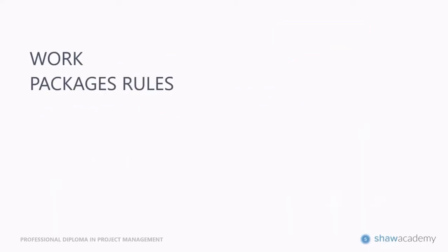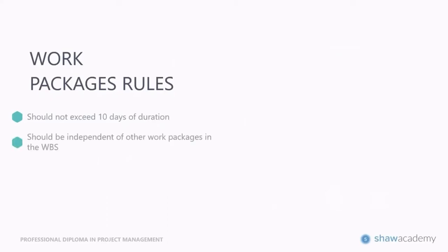Now, like everything in life, work packages have rules, and the first is that you should never exceed a 10-day duration. Your work packages should be independent of other work packages in the work breakdown structure, meaning you don't want them to have to rely on other work packages being completed. They are standalone tasks until they are completed. They should be unique, and you should not duplicate them across your work breakdown structure. In other words, rather have one person doing the design of a certain element rather than having 5 people doing the same job in different places. When the one person's now figured it out, they can simply go and duplicate that work or alter the work to fit in with the other work packages.